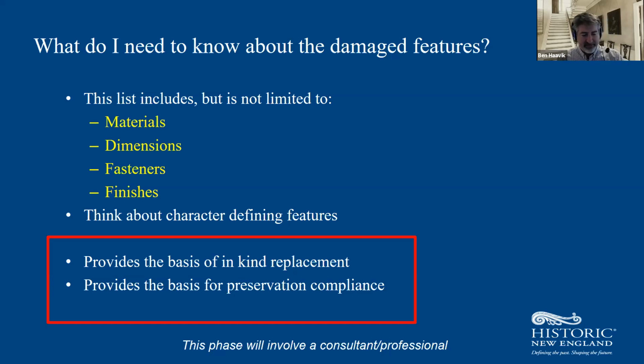And the compliance is really, are you in a historic district? Do you have a restriction from the state? Do you have a restriction from another entity? You have to be able to describe your work and rationalize it. And in-kind replacement is a major component of that.